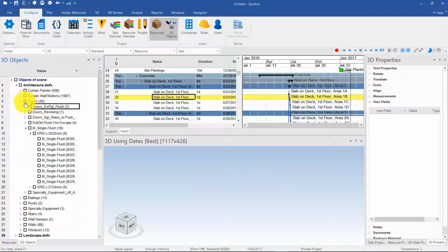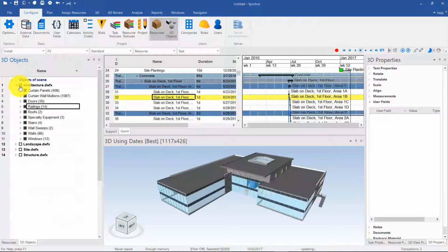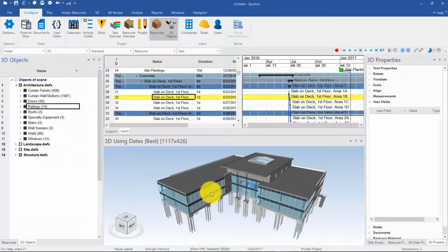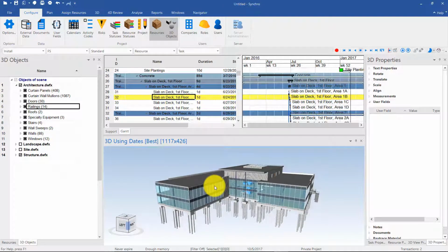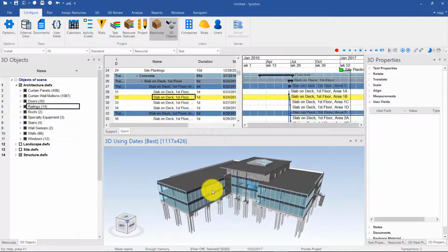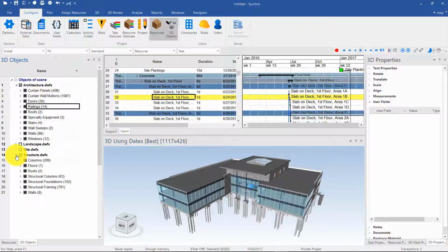However, we can also limit the tree. For example, if they go way more detailed than we want. For Revit, that usually doesn't happen, but if you're importing multiple models in a master plan and you want the architecture to just be one element that grows as a group and then the structure to be one element in a master schedule involving hammock or level of effort activities, you can actually limit the trees for those models to 1. For example, you just import this, it's one object.